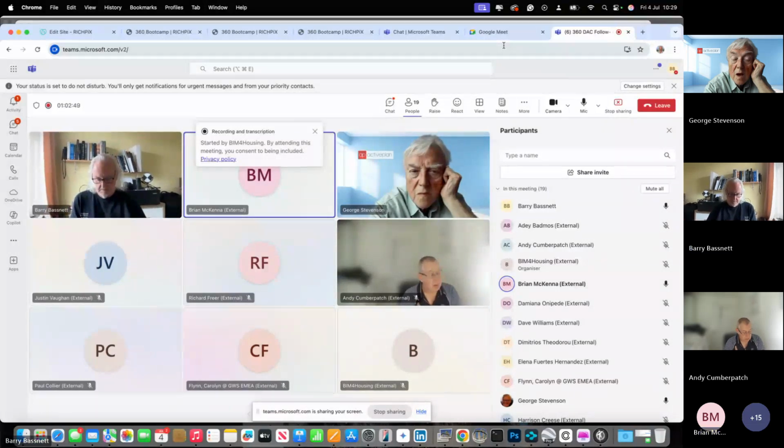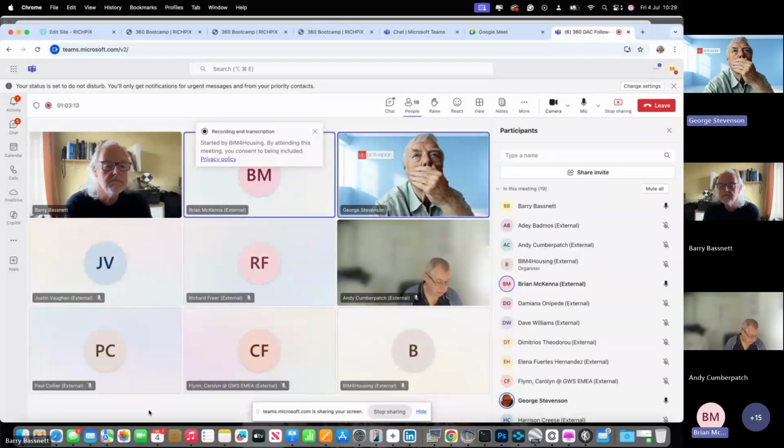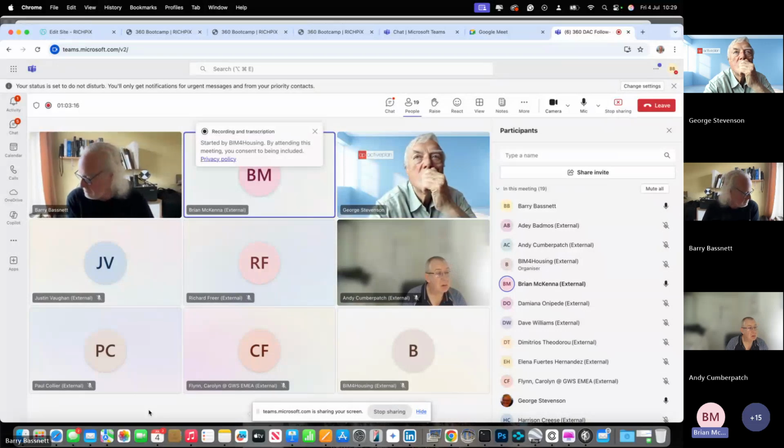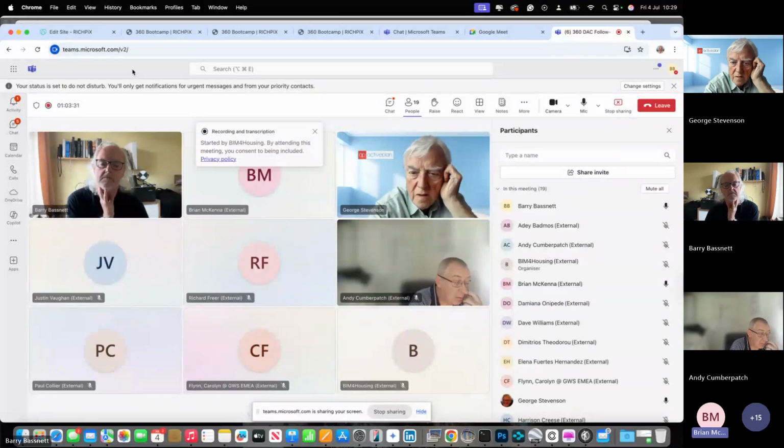Yeah, well, that's a very interesting use case, actually, isn't it? Because you're identifying what needs to be done, and then you're using the 360s and the asset information model to identify, maybe over a 2-year program or something like that, how you can prioritize things. Prioritize, exactly, to get the energy performance much better. They can do scenario-based things, like if you do this X, Y, and Z, replace all your windows with double glazing, obviously scenarios like that, your building will be much more energy efficient. Yeah, that type of thing.